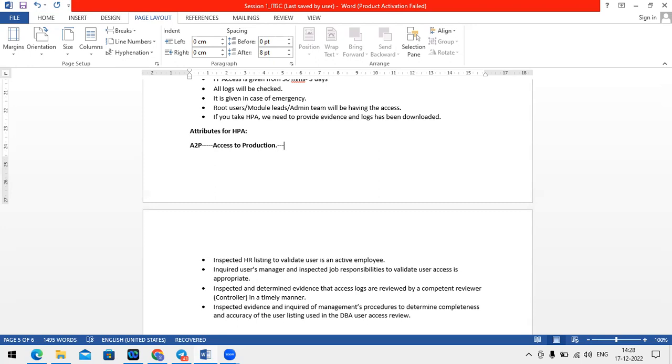Can you please ask him whether he has a valid change request, and if proper approvals have been sought, forward us that change request. Once the change manager gets hold of that information, he will touch base with the implementer and ask for the change request. If that person does not have the change request, then obviously the consequence is that he would be barred from implementing any changes in the production environment, and in a few cases it will lead to his termination as well.